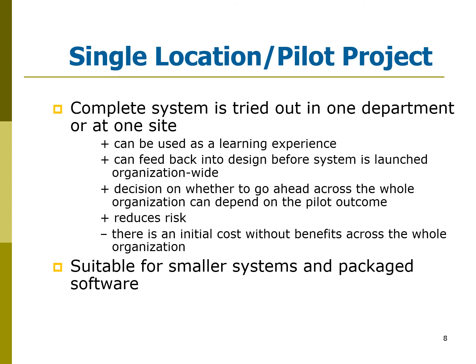Okay, this kind of implementation strategy is good for small systems or package software. So, for example, you install Microsoft Teams first at one school. For example, in a university, one school is actually using Microsoft Teams first. All the members at that school experience it first, and when they feel it is good and smooth, then it is implemented across all schools in that university.